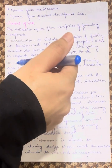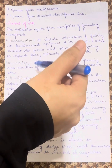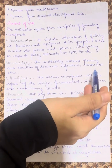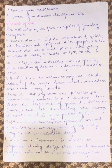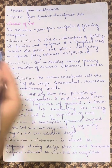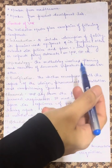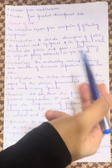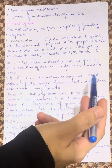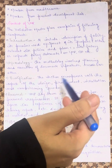Next, we have methodology, which involves planning and execution of document protocols, records, and others. Then we have qualification, where the section encompasses all aspects of design, procurement, installation, and commissioning processes.